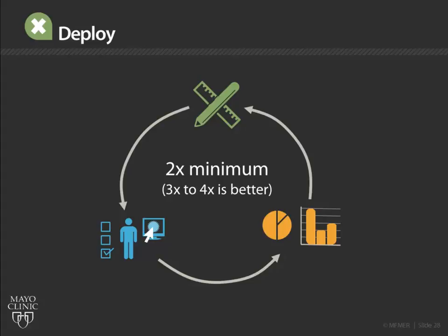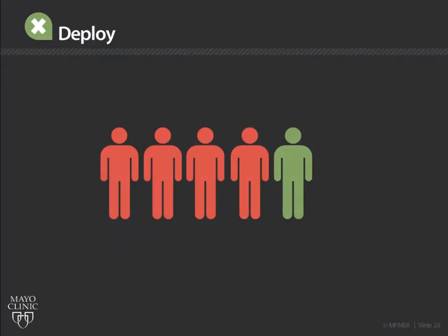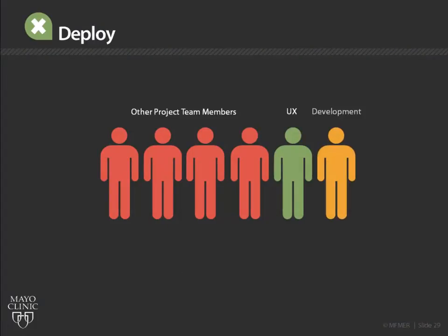After sufficient iterations, at some point it becomes time to hand off the final plans to the development team for building and deployment. Even though I haven't specifically mentioned the dev team yet, it's important for these individuals to be involved in the project from the beginning. They should be consulted whenever major functionality is added or changed, and included in update meetings along the way as the project progresses. Having the development team at the table allows for early collaboration and encourages a sense of investment in the project.